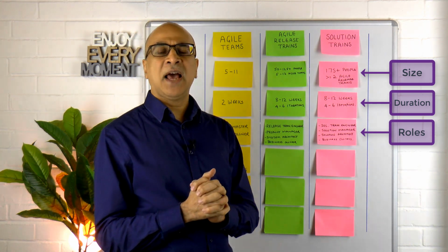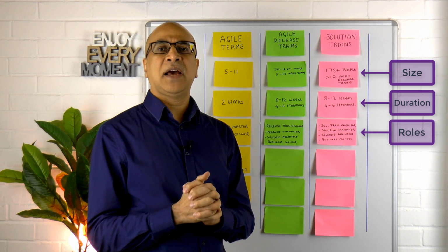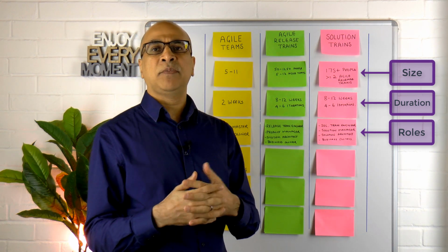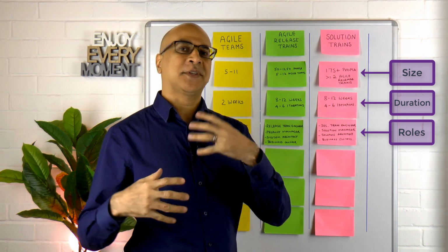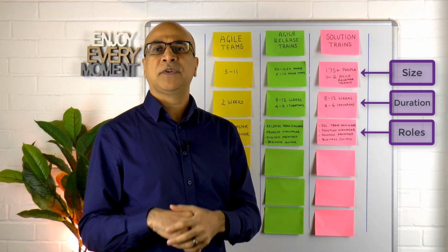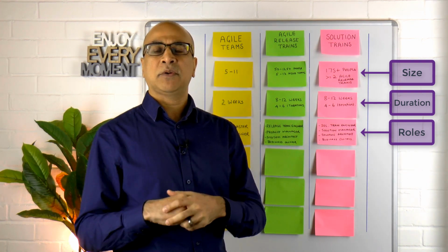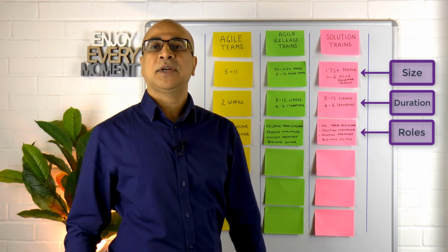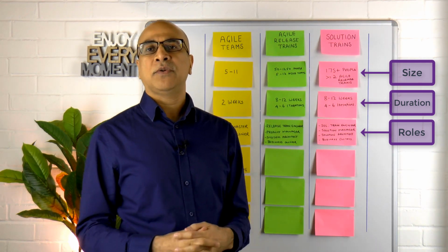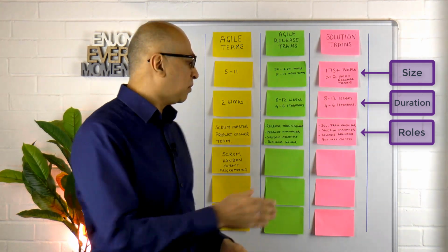The challenge we have with that is that we need to have some modicum of stability when we're using Scrum. For example, if we're in an environment where something's constantly changing, we could be in a support team, for example, it becomes very difficult to plan for a 2-week period because we don't know what's going to happen. Anything could happen over the next hour or even the next minute. So we don't know, so we're not able to plan in advance. And that's where we use Kanban.